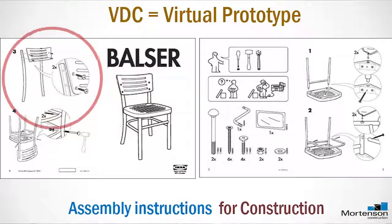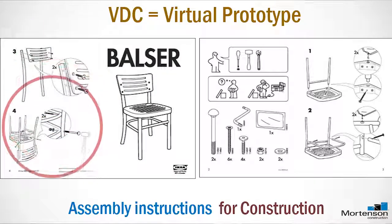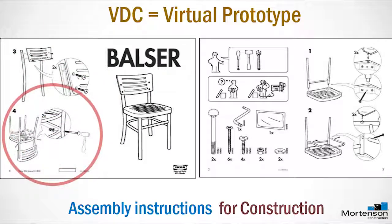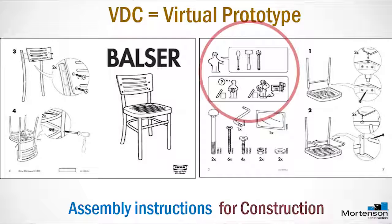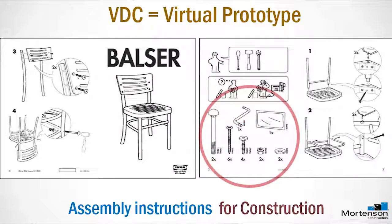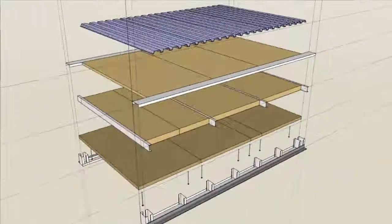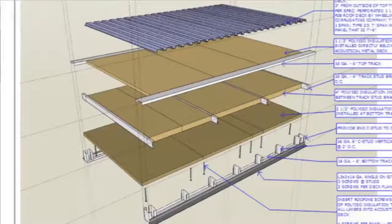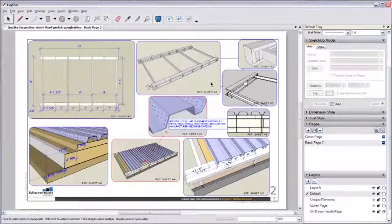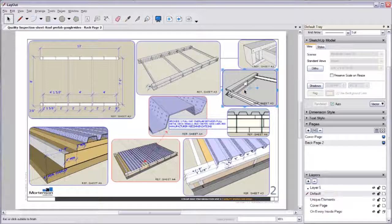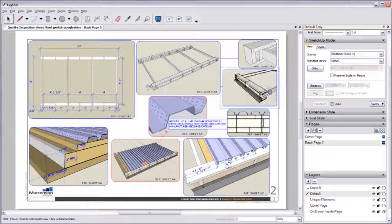We're applying the sequence of the assembly of this chair. Now also look at the tools and the parts involved in assembling this chair. These are all assembly instructions for construction. When our teams perform BDC, in essence we're creating assembly instructions for our crews to go out and build work effectively right the first day.